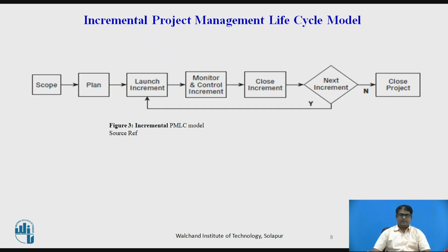Incremental project management lifecycle. So here all this incremental release happens in a linear fashion as shown in the figure. In the end the solution is the same as if the linear PMLC model had been followed. The project ends with the same deliverable in approximately the same time. There is some additional management overhead associated with the incremental PMLC model.